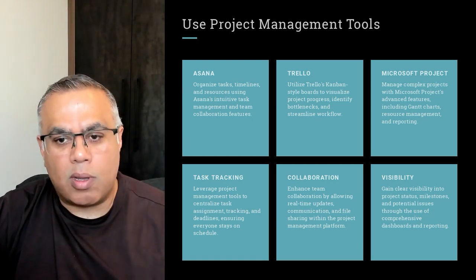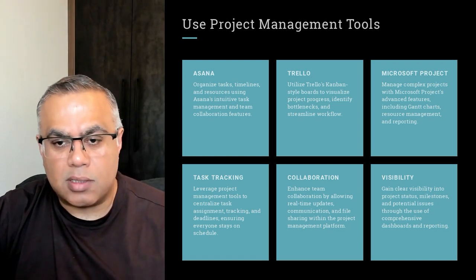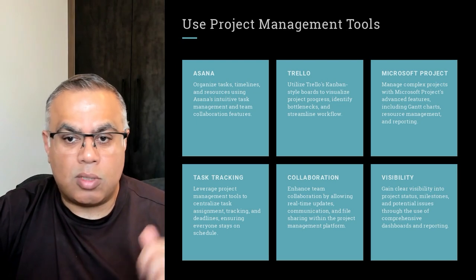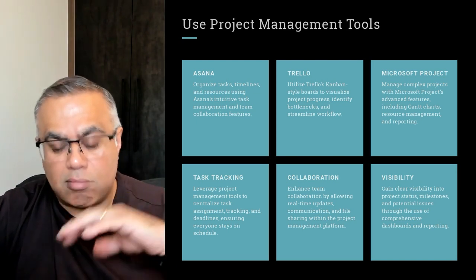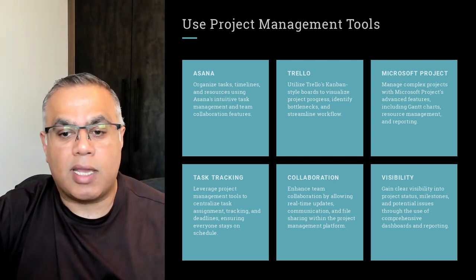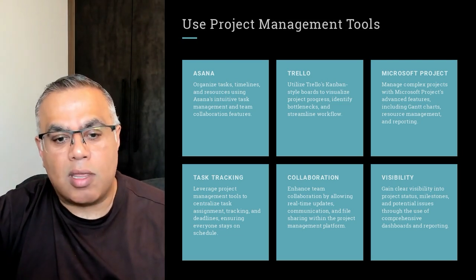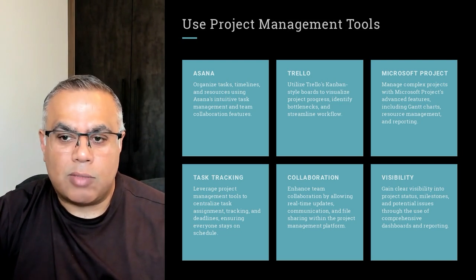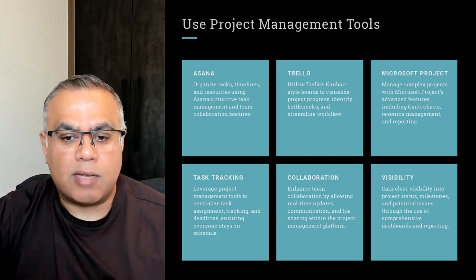I've used Trello previously on other contracts where we were doing scrum meetings in the morning and then dropping activities into Trello and saying, okay, these are what you need to do. On the Kanban board it's today, tomorrow, who's taking which activity, so that people are taking ownership of the activity. As a project manager, I'm overseeing it rather than having to tell people. More of a pull rather than a push, whereas with the critical path, you are pushing people to do things, which is slightly different.